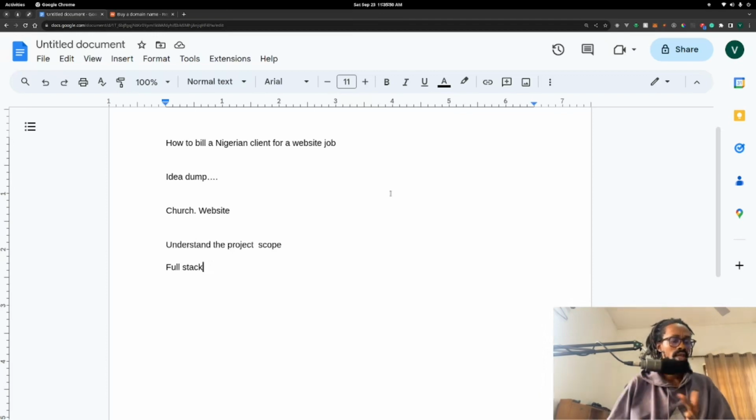So let's break down this project into milestones. So we have landing page, about us page, contact us page, those nice ones. Apparently we're going to box all that into a particular milestone. And this is assuming that they provided their UI/UX designer, graphics designer, content writers, and those people are done whipping up the basic look and feel. So all you're doing is developing.